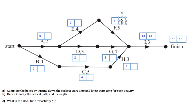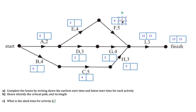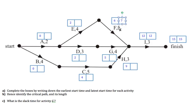Activity F needs to finish in time for I to start at 12 — that's the latest possible time I can start. Activity F takes five, and it needs to finish by 12, so the latest possible time it can start is 7. You can think of that as 12 take away 5 giving you 7. Checking forward: if it starts at 7 and takes 5, it will still finish by 12.